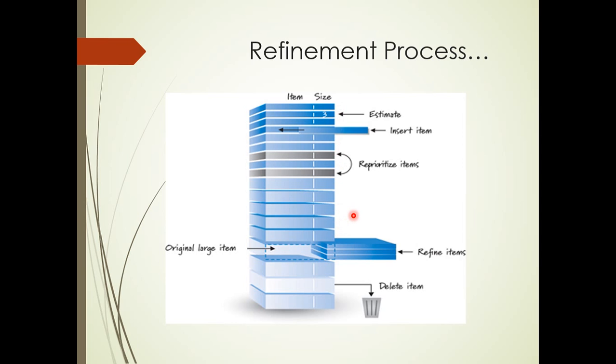Then, if there are any customer requirements that are to be built into the product with a high priority, it's the product owner's responsibility to add these user stories somewhere here in the product backlog. And these user stories are discussed with the team. The team shares the sizing estimates for the user story, and if a user story has a small size such as 2 to 3 story points, then the product owner puts that user story somewhere here at the top of the list, so that it will be immediately consumed in an upcoming sprint and delivered to the customer. If the user story sizing is like 8, 13 or 20 story points, then definitely it would be at low priority and listed somewhere here. And once the top priority user stories are finished, the development team will look into these user stories.